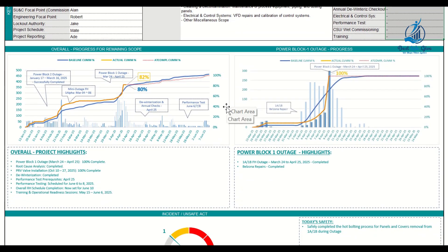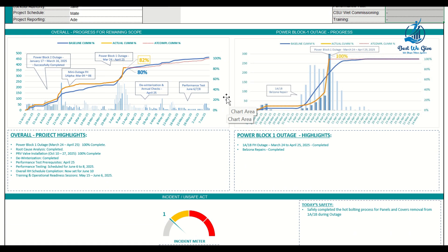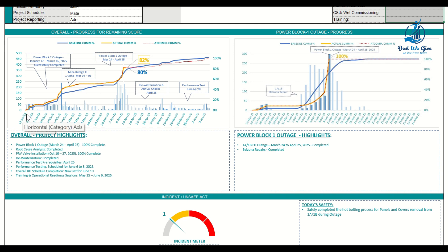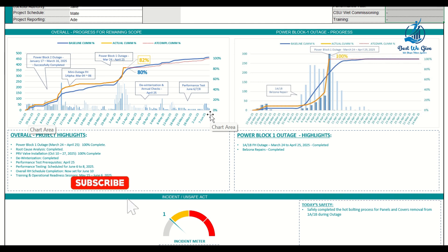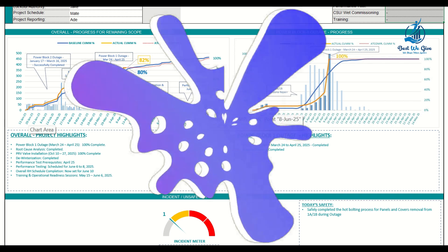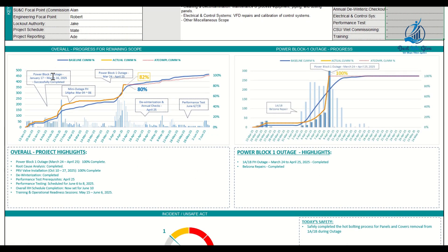Now we come to the S-curve section, which is really a game-changer. It's a dynamic S-curve that comes from your project schedule data. I've built this for six months, but you can build it for 12 months, 24 months, three years, or five years — it's super easy. For example, the start date is in January and finish is in June 2025, covering different major scopes of work within the project: first portion in January, second in February–March–April, ending mid-June.